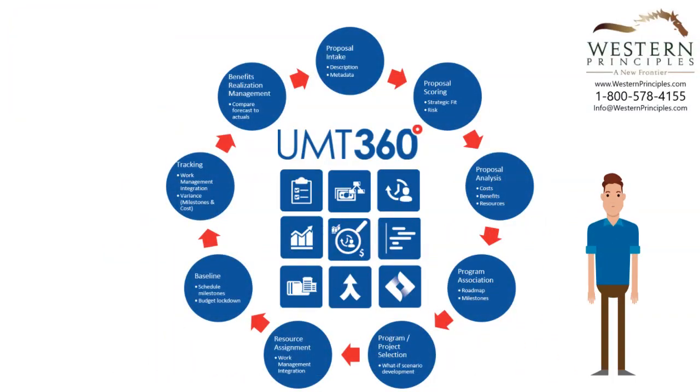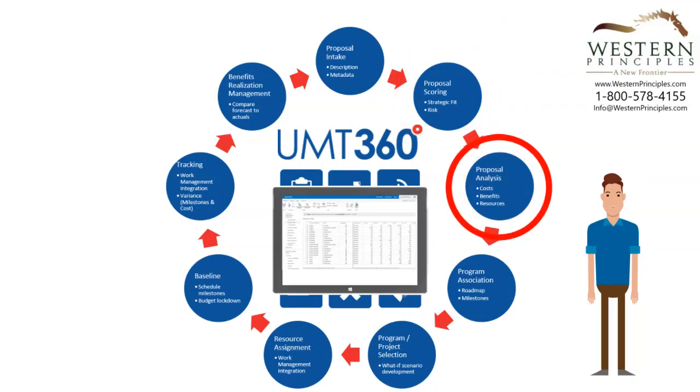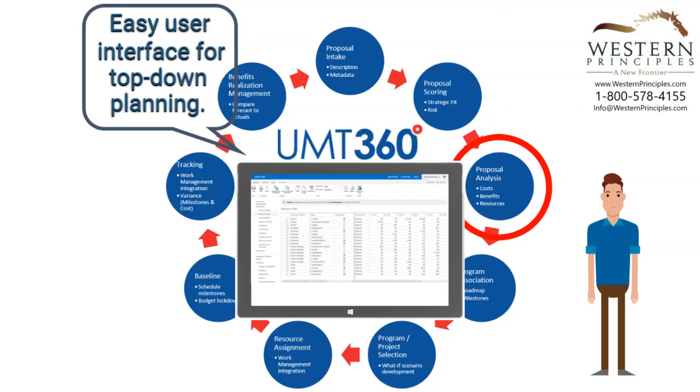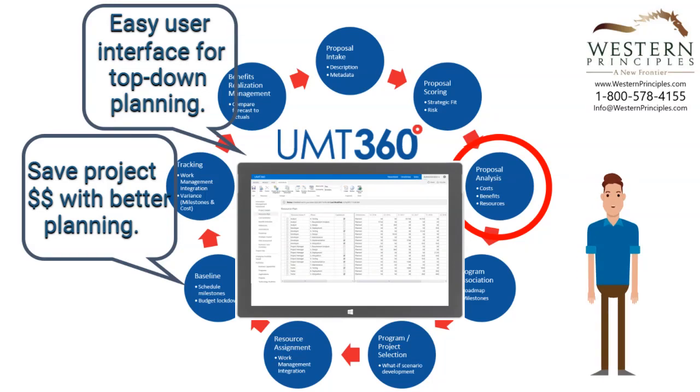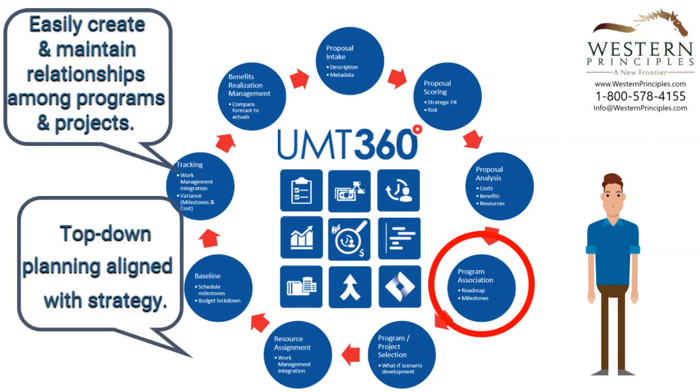The process starts with proposal intake through a questionnaire, which allows you to gather information about the alignment with business strategy, proposal risks, and really any other factor you want. You model your project projecting the business benefits, both hard dollars and soft value propositions, the costs, and the resources needed to deliver on your project. You can do this top-down, thinking of a program which ultimately breaks into individual projects across your business, or as individual projects.